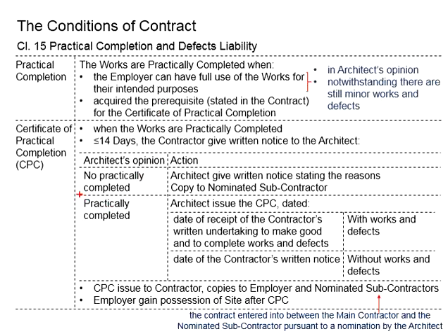Next, if in the opinion of the architect it is practically completed, the architect will need to issue the CPC. However, there is a slight difference in terms of the date of this CPC, depending on whether there are still minor works or defects to be rectified.